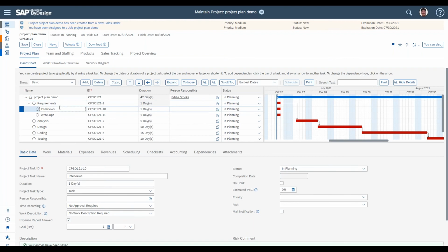The other thing you'll notice is that once I've created these subtasks, I'm no longer defining the duration of the summary task itself, and that's because it's now calculated based off of the duration of the underlying subtasks. So we'll see here, as we enter that in, we've got two tasks, 2 and 3, and it's going to be taking the total duration of those. And if we scroll back, you may wonder why is that 5?